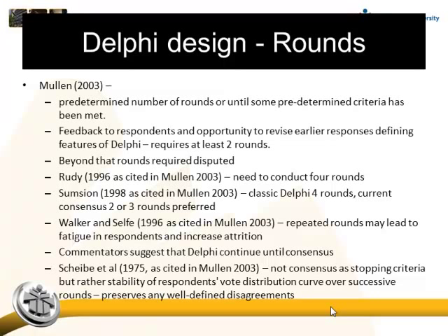Okay, and it depends on what you are trying to achieve with your Delphi. If you want everybody to buy in to the result, then you want to get to consensus. So everybody must agree. Okay, but that's not always the purpose of a Delphi. For example, with the Delphi that I did about project success with the students, I just wanted to see what are the top factors. At the end of the day, everybody is not going to agree, but there were enough respondents and enough measurement to say, okay, these are probably the top factors.